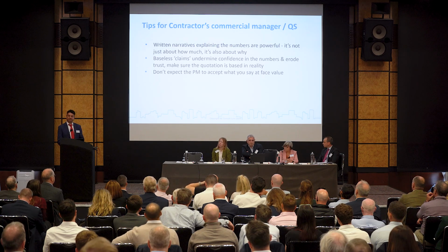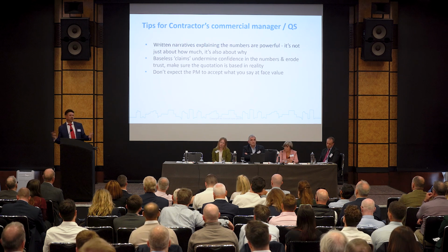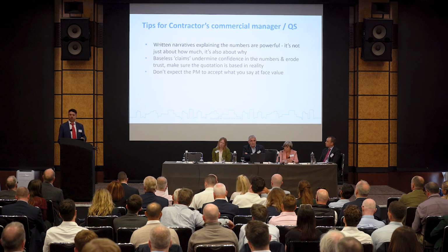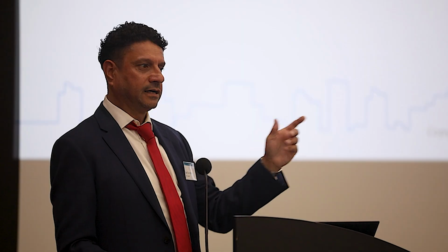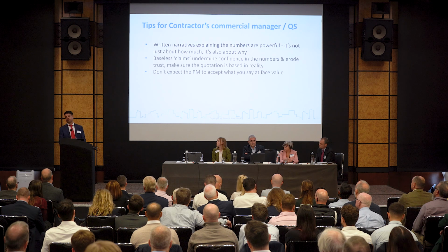Same job, but a year earlier, I reviewed a compensation event where the contractor claimed for all the prelims on the job. And I'm thinking, hang on, this delay happened at the start. All the prelims weren't there. I asked the site supervisor for a photograph from the period. Empty field. Not good, is it?